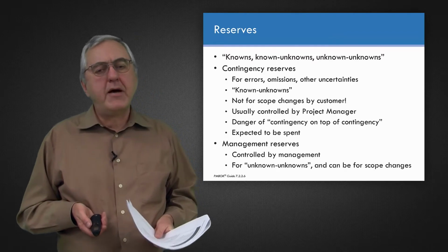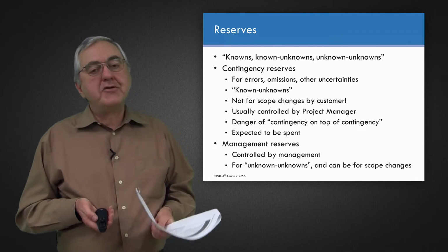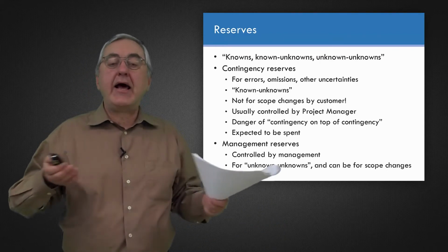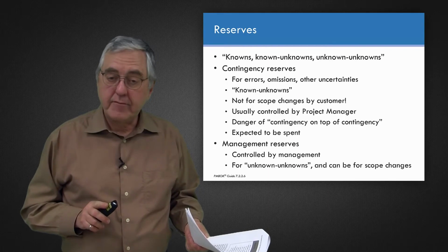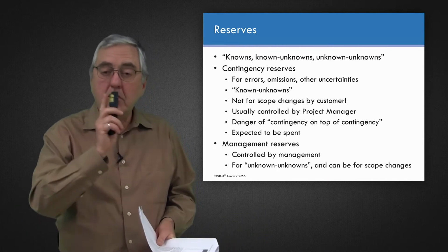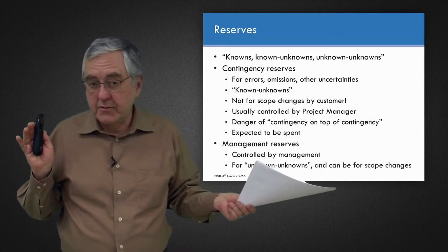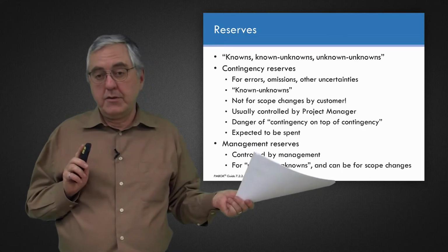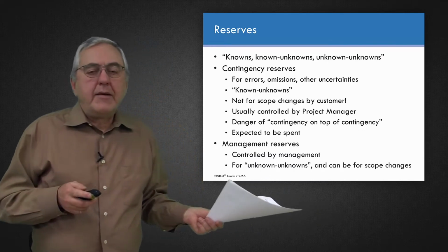Management reserve is money that your management or your customer has in reserve as well as the project budget. You do not have the management reserve. Your customer or your sponsor has the management reserve. You probably don't know how much it is. And it's for unknown unknowns, or it can be for scope changes.